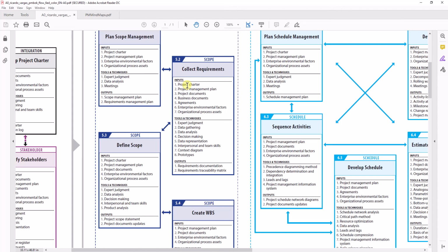I have to just make a decision based on technical feasibility, based on the time available to me, based on the budget available to me, based on the risks. And I should not be introducing a new risk by trying to do all these various things. Then you will make a decision and say, this I will do in the project, this I will not do. You draw a boundary between them. That basically is the scope.